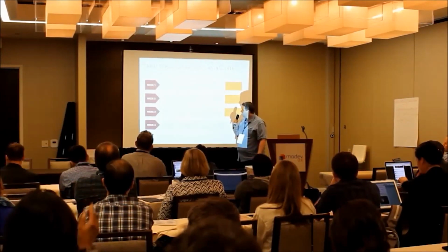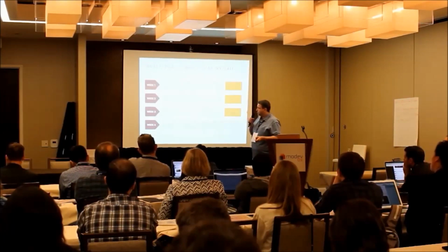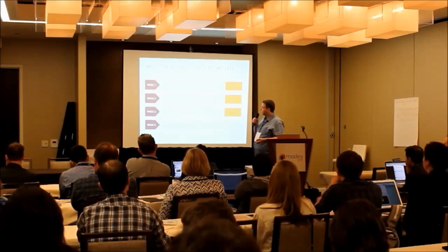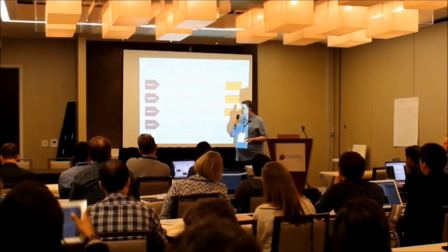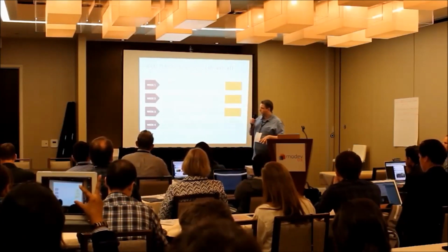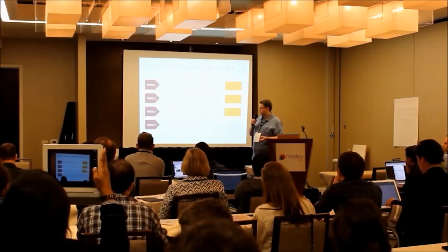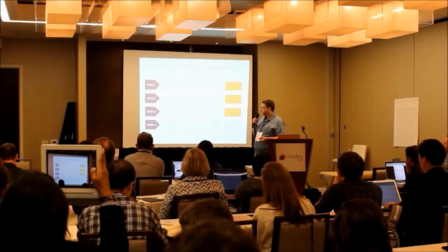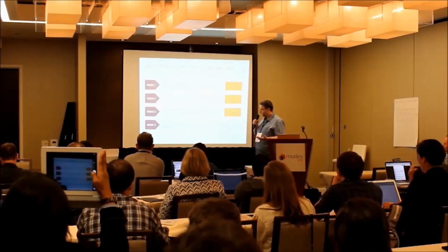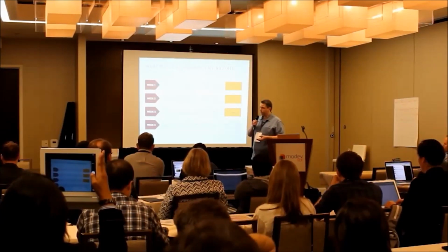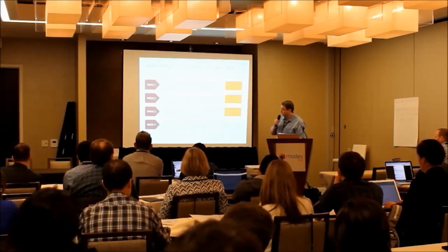So we would go through a typical Innovate, which would be a 4-week process. We do a lot of research. Then we'd go through workshop, ideation, and lots of iteration. Week 2 would be more of the planning and the prototyping. The user research will lead us to a lot of these ideas, and then we would move on to actually starting the prototyping on week 2. By week 4, we have an evaluation and a pitch deck and something that we can actually deliver to the client. It doesn't always work out this way, but this is pretty solid.